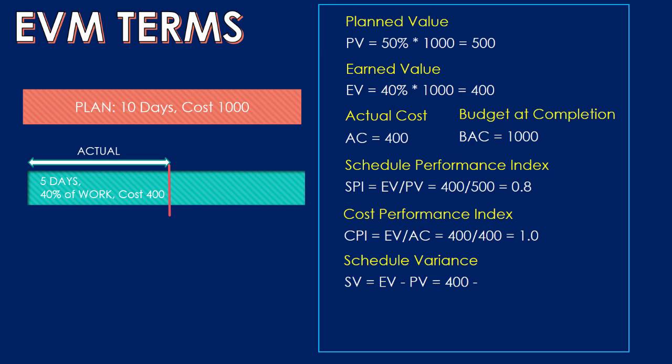We can also calculate variances. Schedule Variance (SV) is the difference between earned value and planned value — it measures the amount by which the project is ahead or behind the plan. A negative value means behind plan; a positive value means ahead of plan. Cost Variance (CV) is the difference between earned value and actual cost — it measures how much the actual cost is ahead or behind the planned cost. A negative value means we are over budget; a positive value means we are under the planned cost.